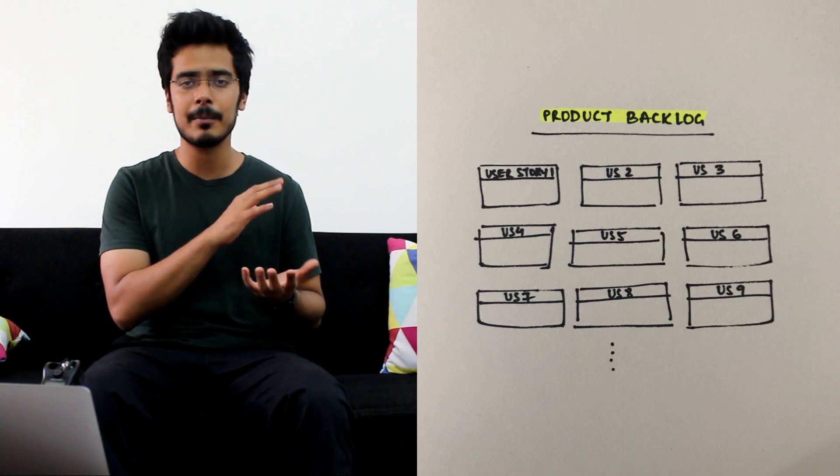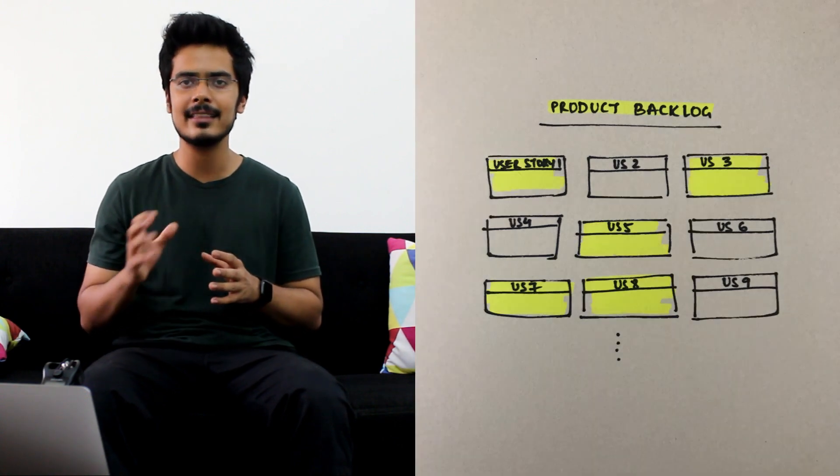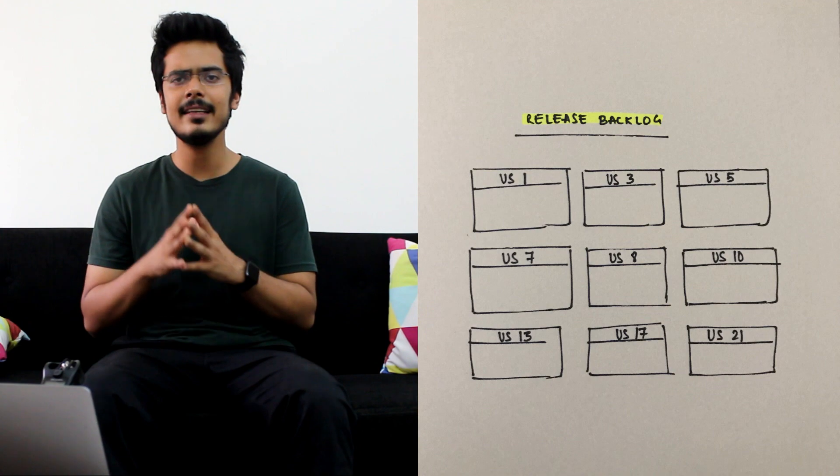Let us now look at how all of these teams come together to ship product X. It starts with the product owner. The product owner picks stories from the product backlog which needs to go in the next release cycle. This is called the release backlog.